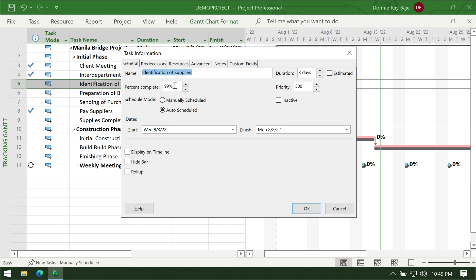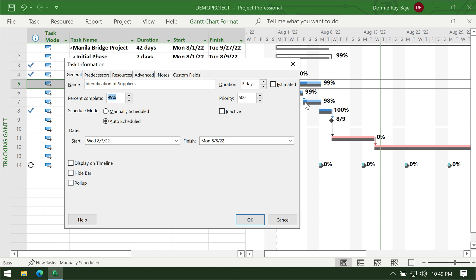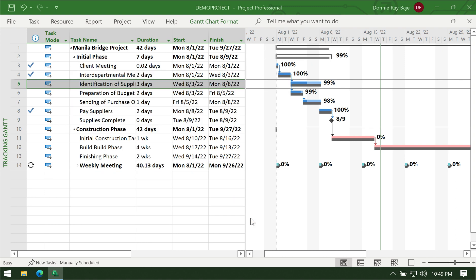You could also change the percentage here. This one would be better if you want to be a bit more accurate about the percentage completion, because if you remember, dragging from the bar will also work but it requires estimation, like how long you're going to drag that cursor. Here you can explicitly mention what percentage exactly you have for the completion rate.